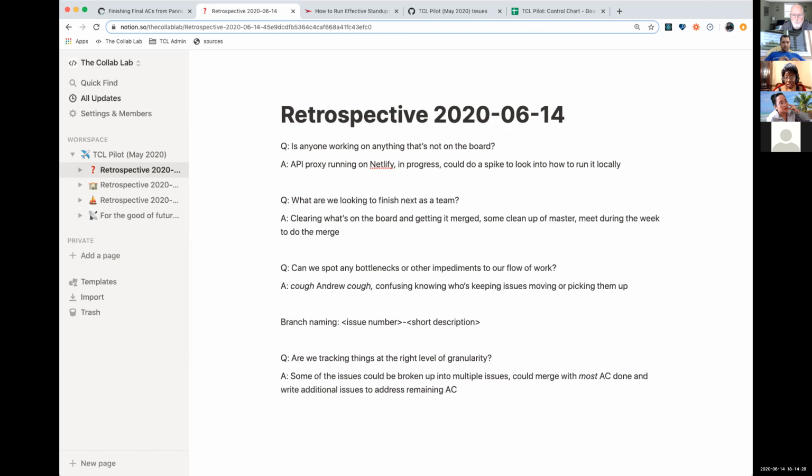One other question I want to ask is, I'm wondering if 7 days is a little bit too much for one issue, because for Kanban we have to spend more time talking to each other, and I think communication takes up a lot more time in the coordination of this execution style. So I'm wondering if we should knock off 1 AC, or an hour or 2 of work from each thing as a right sizing metric, just because it always seems like our issues are behind by a day or 2. They spill over into the next week, and I think that's part of the reason why. Yeah.